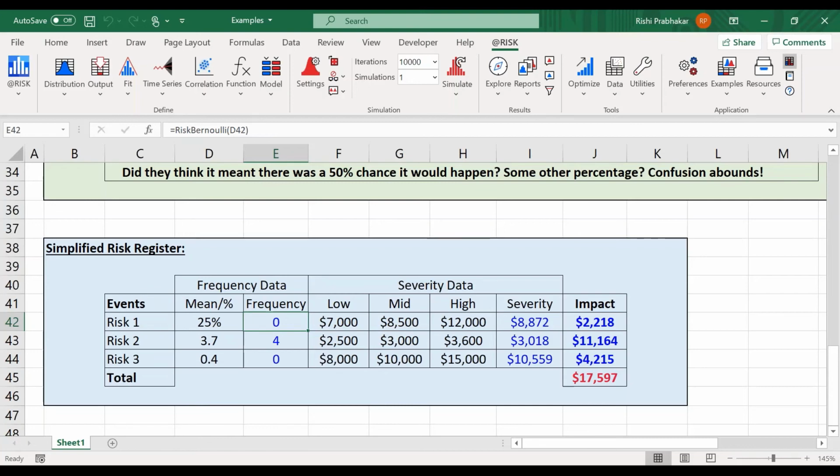The reason I would never do that is if you make the probability of something a variable, essentially you are in a position where you're basically unable to interpret the simulation data that comes out. And here's why. Each iteration of a simulation isn't actually consecutive time periods. Each iteration is the same period over and over again with some random variation. The probability of an event occurring simply is some number from 0 to 1. It shouldn't change from one iteration to the next.